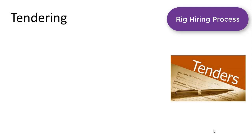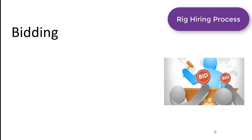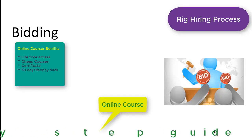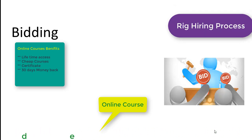Once the tendering document is submitted, different rig contractors who have rigs will prepare their proposal or bidding. The bidding is the response to the tendering — rig contractors will communicate their interest to the operator company with a document called a bidding or proposal. In the proposal, they will show that as per the operator's requirements their rig has specific specifications, and they will also provide their price, including the day rate, standby rate, rig mobilization cost, and related items.